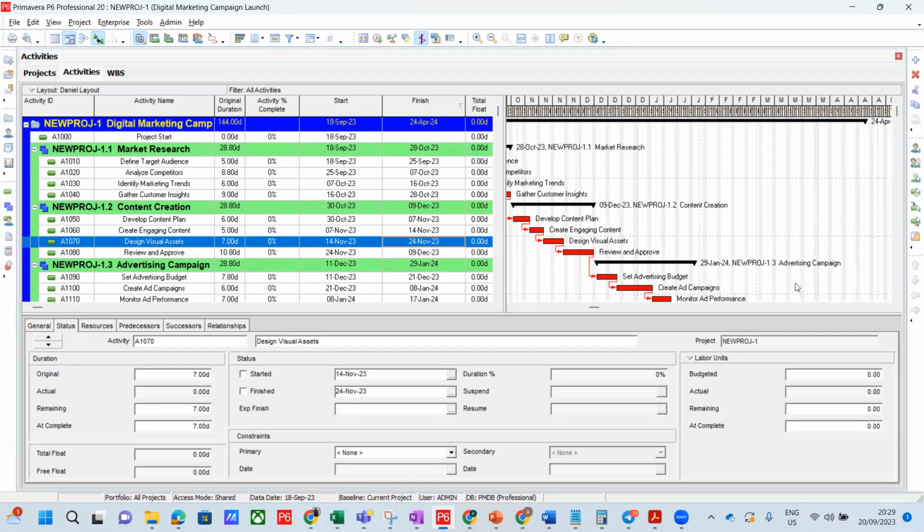Do you understand? Yeah. But the argument, the best practice would have been, why don't you put an activity in between them called concrete cured or concrete set? So that when I'm reading through, I can see where the 5 days is coming from.